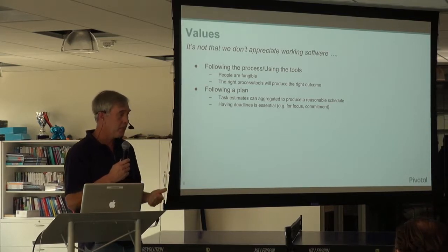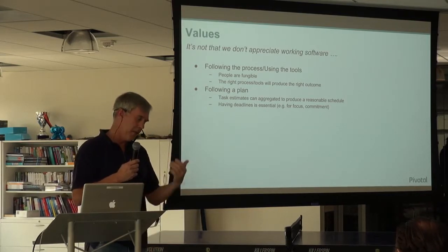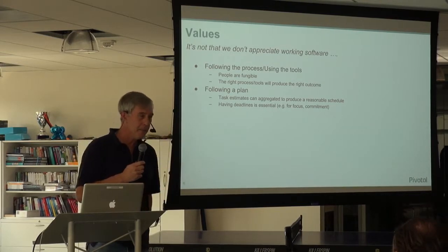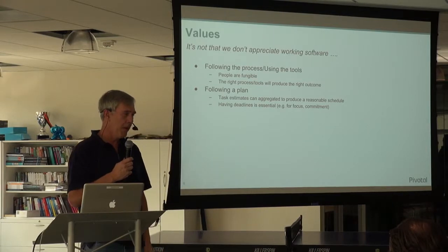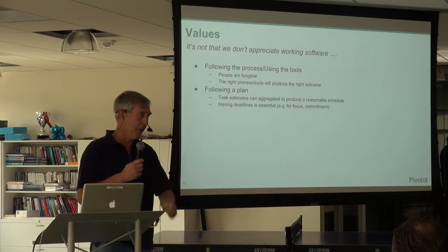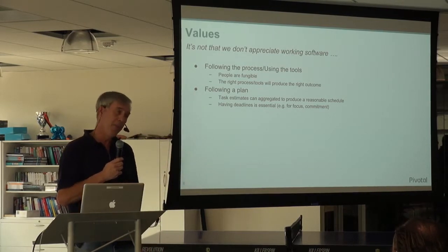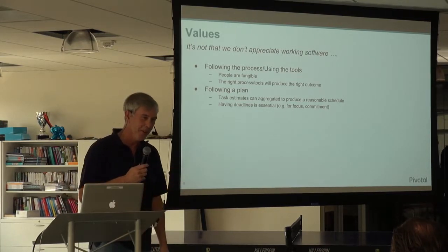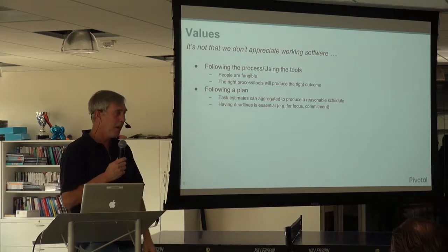So one of the key things that would happen with all this is you go through this loop. Go to the developer and say, how long will this task take? It will take 4 days. Okay, I'm holding you to that. So you do that enough times, and the developer goes, whoa, there's not a lot of incentive for me to be aggressive here. So you say, well, next time around, how long does it take?